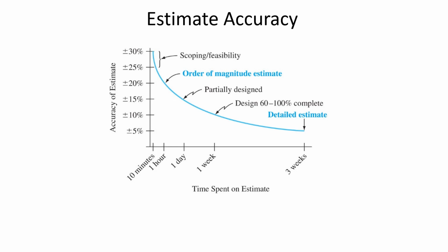And so the question becomes, how much does it cost to generate a really detailed estimate, and is that necessary at every stage of development and design? Sometimes maybe the 10-minute estimate is good enough. Like if you know, for example, that you've got a $5 million grant from the state legislature, but the building is going to cost $50 million plus or minus $10 million, well, you already know you can't build the building.